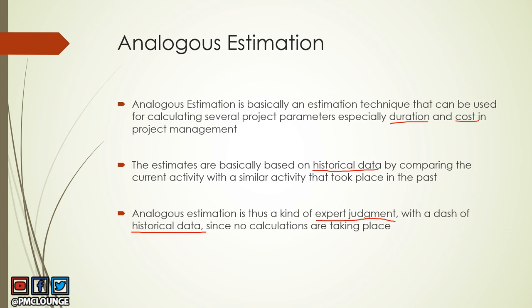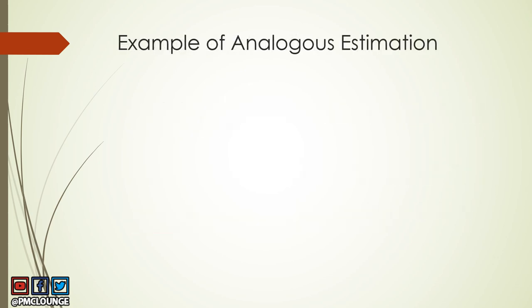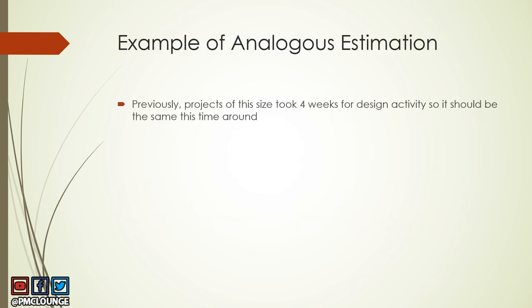Do keep in mind that you are not doing any kind of calculations here — you are simply making a judgment based on the data at hand. For example, previously projects of this size took four weeks for the design activity, so it should be the same this time around. You look at the current project, draw the comparison, and estimate four weeks for design.